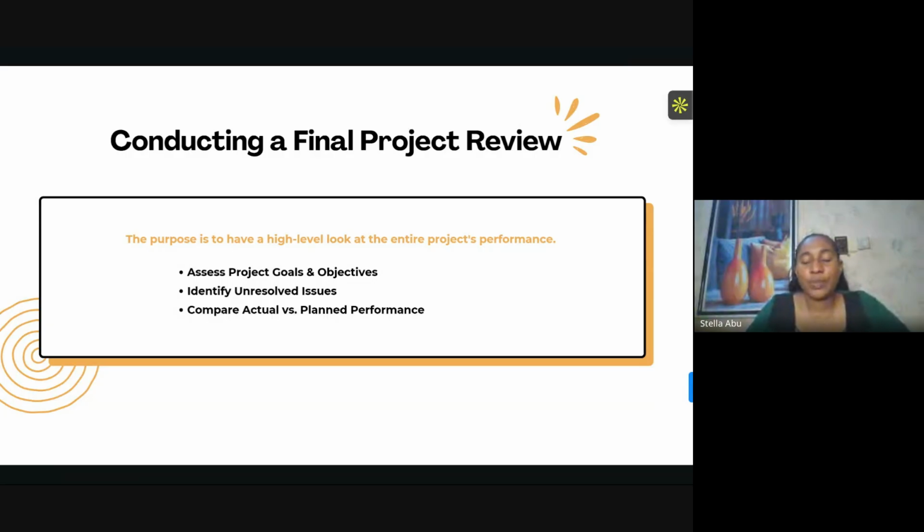So what I'm saying is, you see that part where you look at your question book, your answers, to say, what did I answer? What did I do? That is a review of your answer sheets. You are reviewing what you've done. The same thing as a project review. You're looking at your project goals and objectives. Did I meet these goals and objectives? Am I able to identify unresolved issues? What was the actual thing versus what I've done so far?